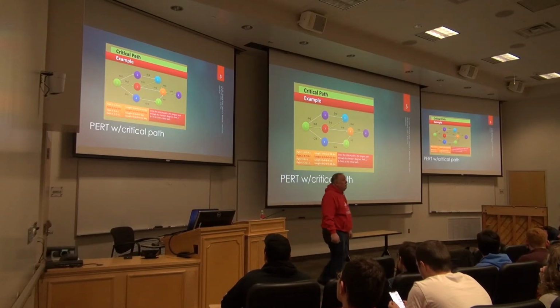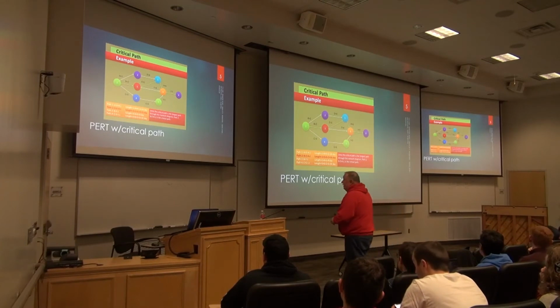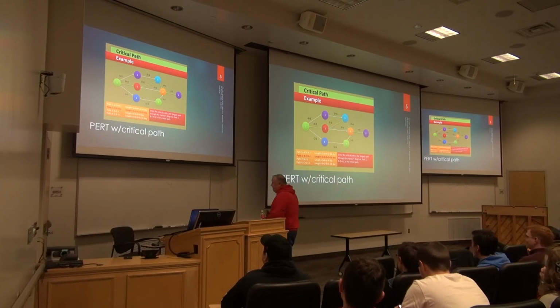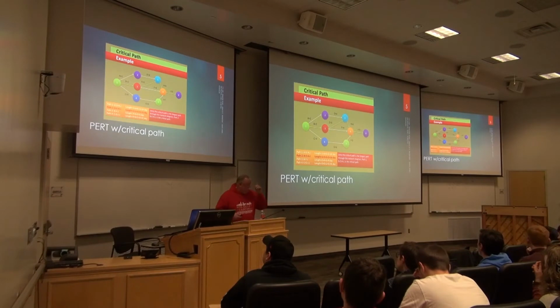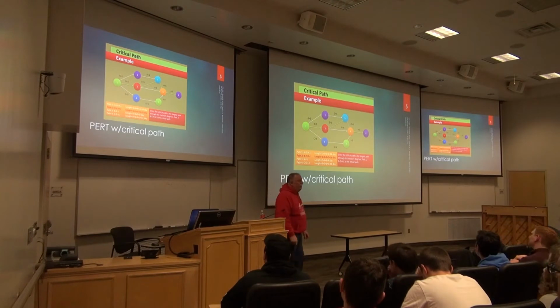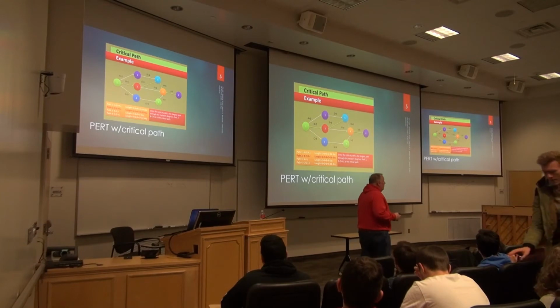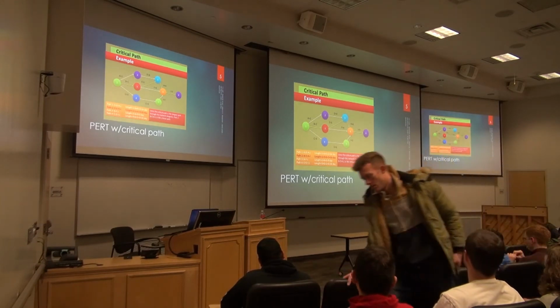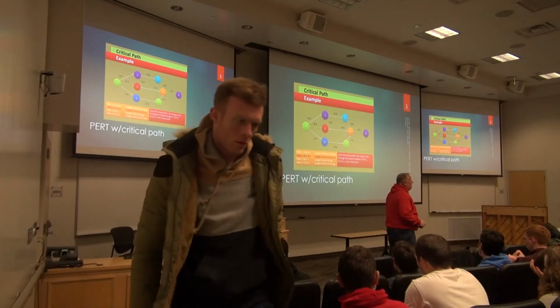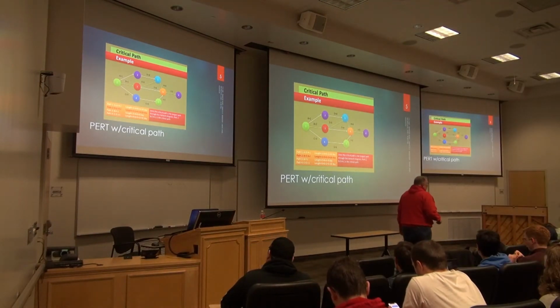So one of the two things you'll have to do is create a PERT chart for your team. You're going to need input from the team on this. You want a PERT chart that has demo 1 and demo 2. Figure out what you need to do, work backwards, and from that start adjusting and assigning work out. Figure out what you're going to have to do, how much you can parallelize, and how much is really dependent.